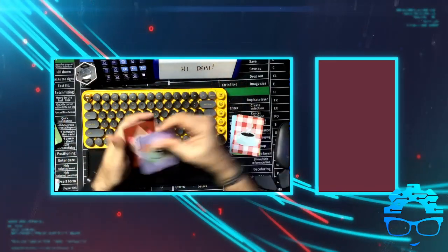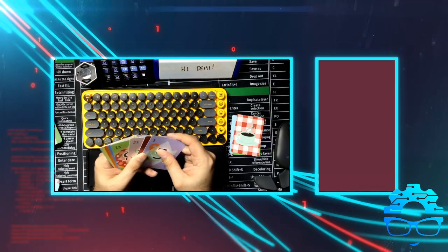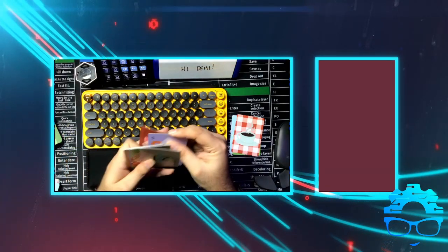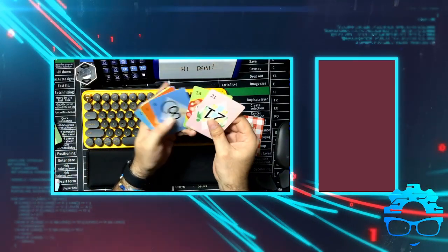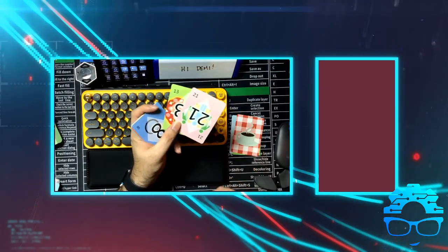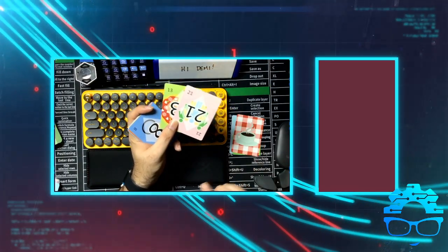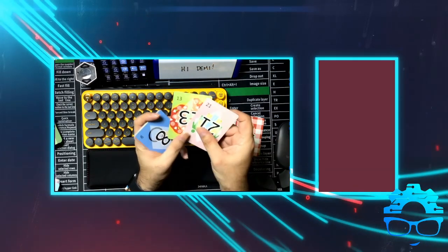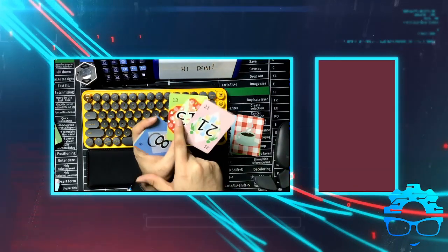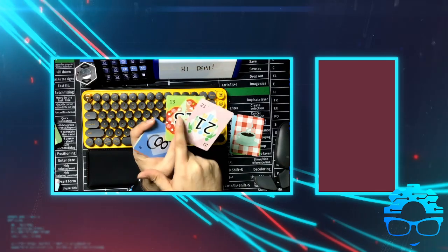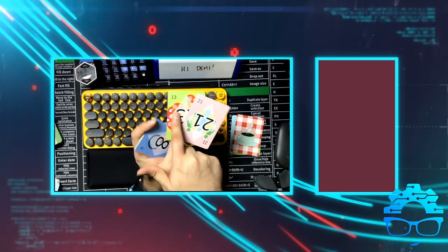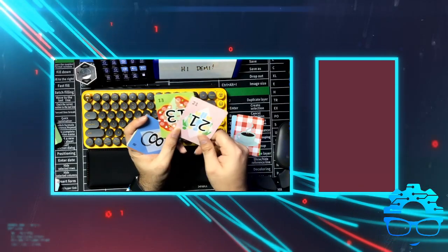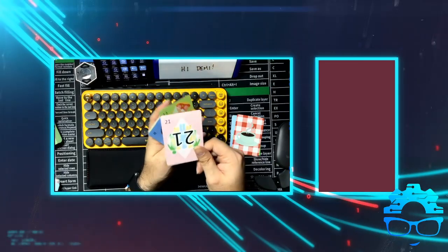Now, actually, let's talk about the points system again really quick. I have a set of rules in my teams where if we have any 13s or 21s, those at the very least need to be considered to split into multiple tasks. And this one, it's not even a consideration for me at this point.